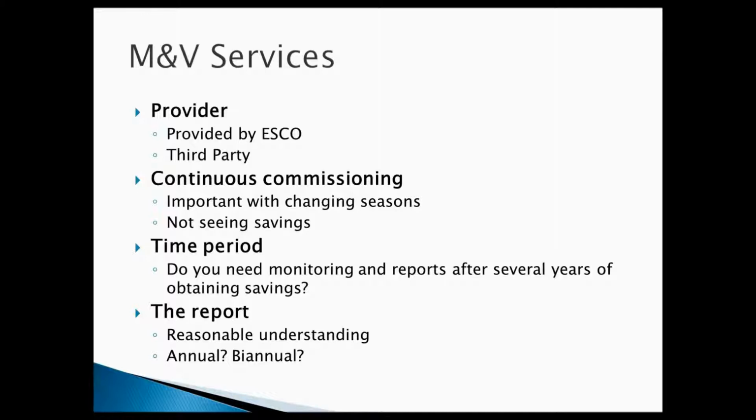Unfortunately, it isn't always just as simple as reading your electric bill at the end of the month. The ESCO might, for example, have guaranteed your lighting would be twice as efficient, but if you end up using those lights twice as much or make some other choice to use more power, one couldn't expect the ESCO to pay the difference. The guaranteed savings are going to be measured against a certain baseline, and that's going to consider some factors such as operational hours and use. In most cases, the site will achieve the guaranteed savings and everything will go as planned.